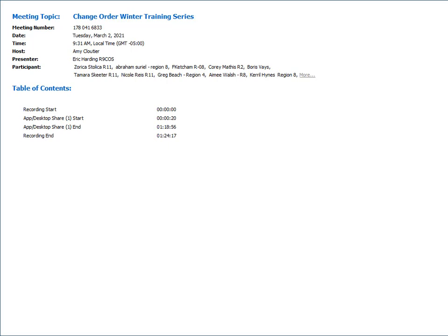This does not necessarily cover all the nuances of a design build for those of us with those contracts, and it doesn't cover all the nuances of a work order or a where and when contract. So as far as what equipment needs to be on site or will be allowed on site or will be compensated needs to be discussed up front between the engineer and the contractor.